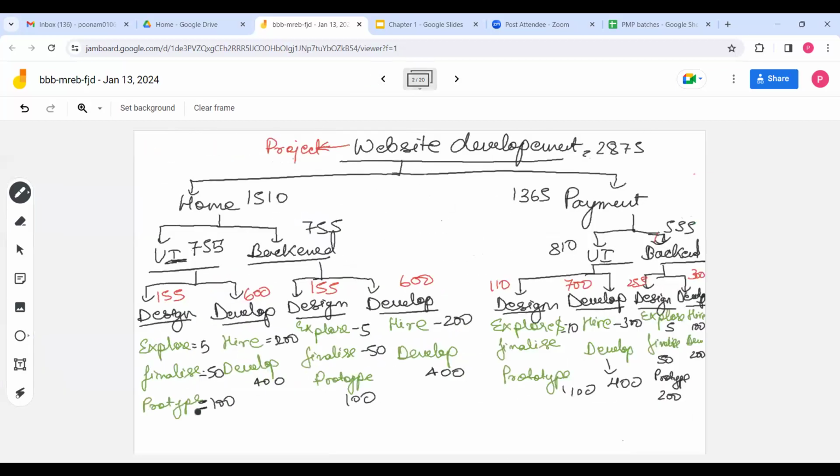See, here you have taken, let's say, prototype $100. What if you show to your customer and customer does not approve the prototype, suggests some changes? You again go and do changes. So it will require extra money, right? Because extra days you are working, that means you will pay salary to people who will be working on prototypes.